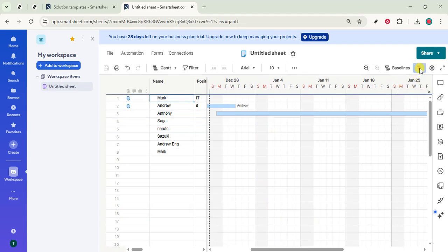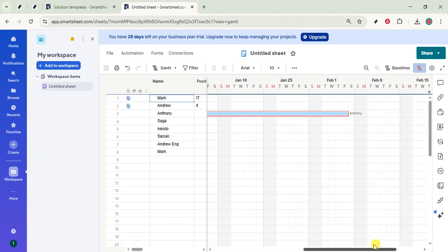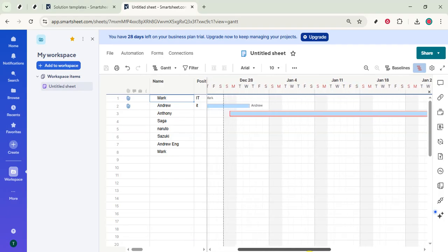Take a moment to scan the highlighted bars from the first linked task all the way to the last one finishing the project. That's your critical path. If you adjust a duration or move a date on one of these tasks, notice how the project finish shifts. Conversely, tasks not highlighted usually have float, so small changes there may not affect the end date right away.